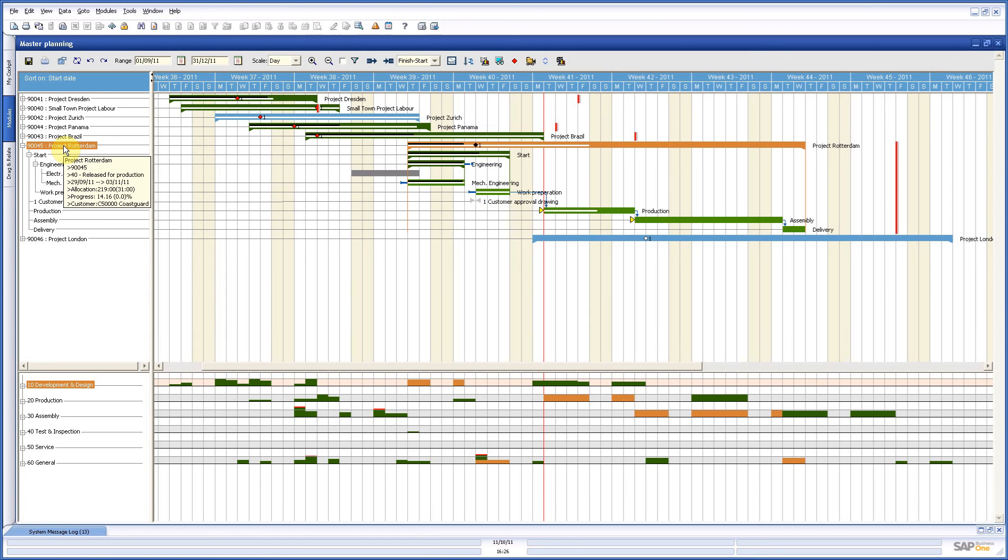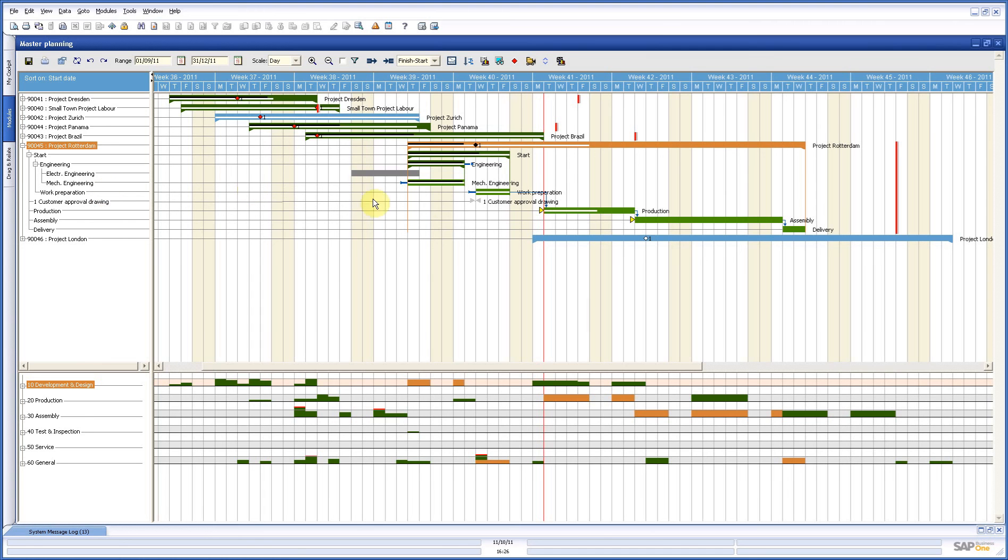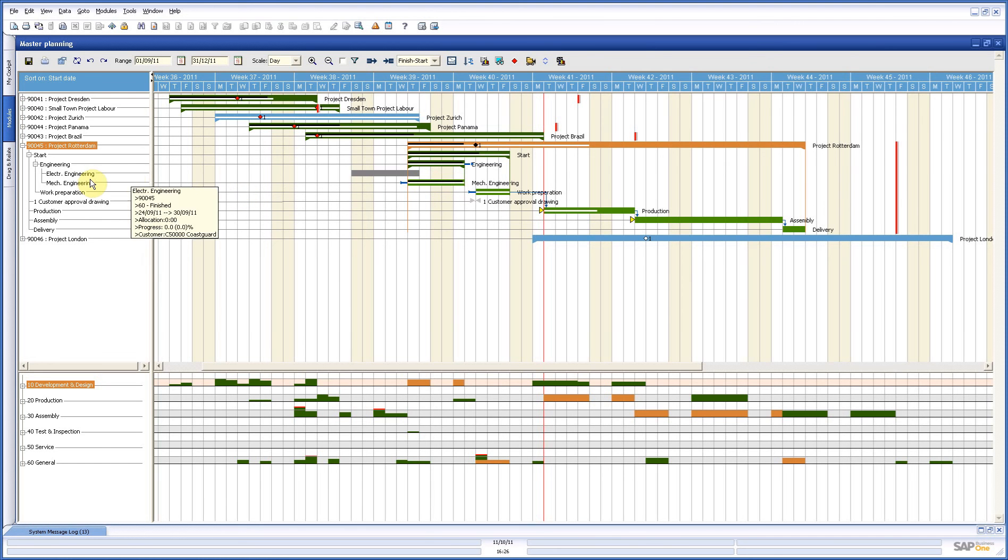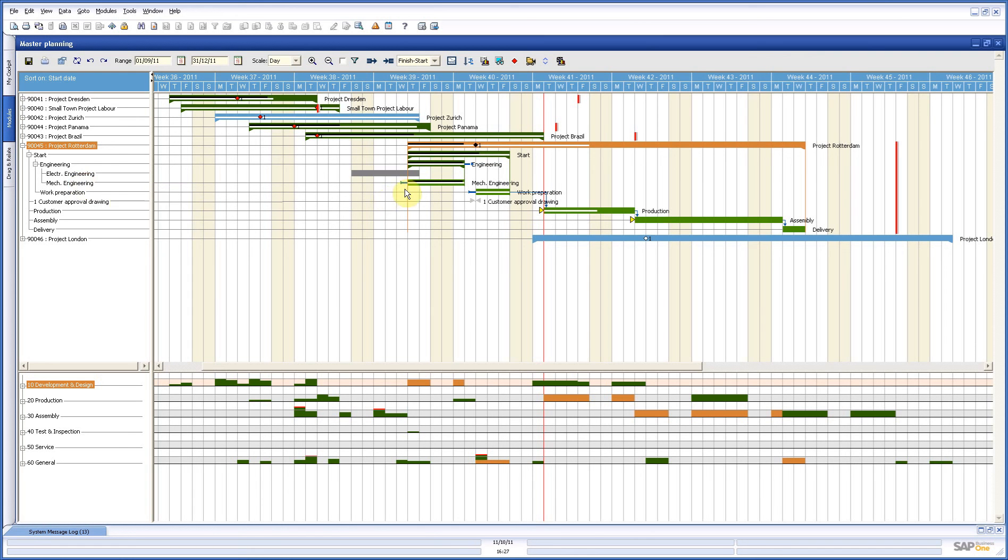And what do we see? First of all, we see white and black lines in our activity bars. What does that mean? The white bar means that it is already planned. So in the department planning. And the black bar means there is already worked on. So if I put my cursor here, I can see that my allocation is 32 hours. Between brackets I can see that I have worked 31 hours. And that represents this black line.